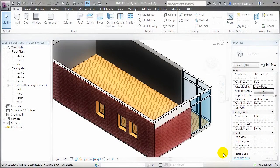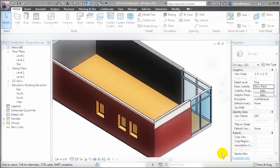Another advantage to working with parts is that we can use them to model material changes in specific areas without having to create new types for every small material change. A common example is floor elements — rather than creating separate floor elements of different types to represent different areas where the finished floor material is going to change, we can convert the floor element into parts and then divide the parts to represent the different areas that will have different materials applied.